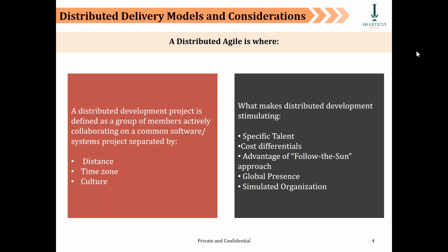Second, there's an obvious cost differential, which means you may like the cheaper shop, for example India, where the blended cost for each resource is way less than UK. So you may like more of the project to be done out of India because it's going to cost the overall project team less money. So cost differential is very, very important.